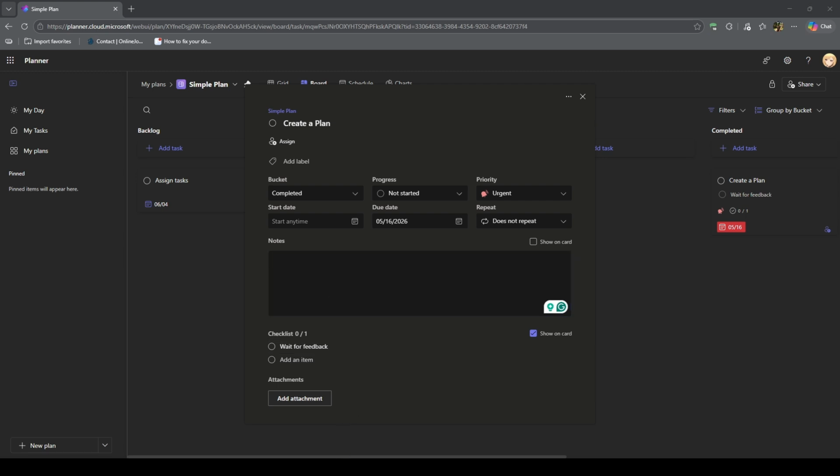If your project needs real dependency tracking, timelines, milestones, and automatic schedule changes, consider using Microsoft Project. Microsoft Project is designed for more advanced planning and includes proper dependency features. So, while Microsoft Planner does not support automatic dependencies, you can still manage them manually using descriptions, checklists, labels, buckets, and comments.